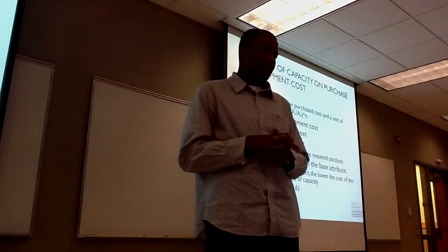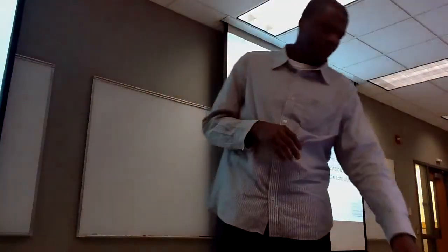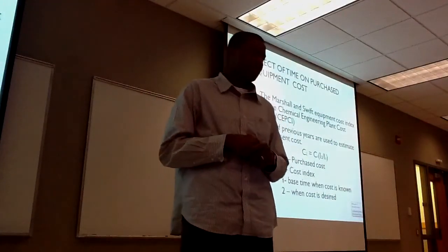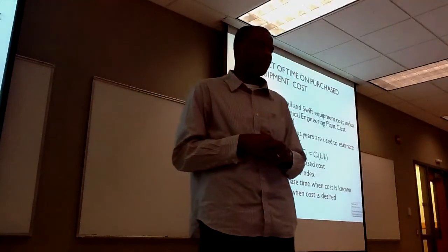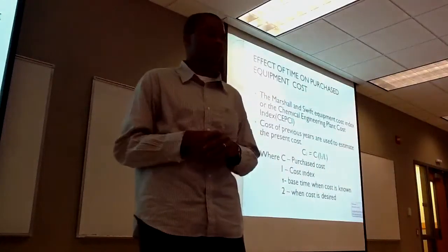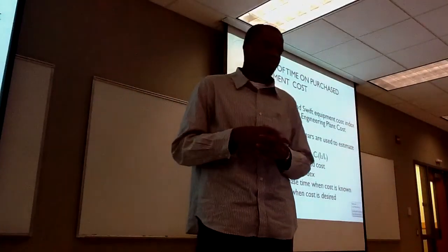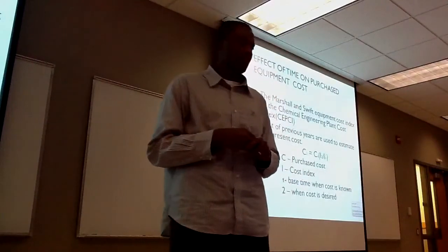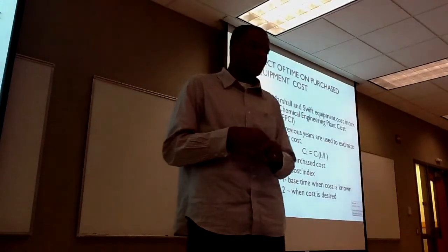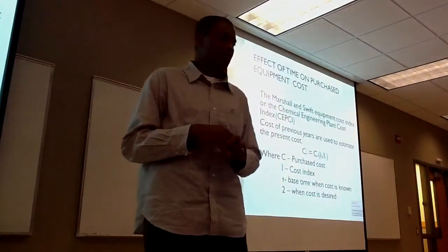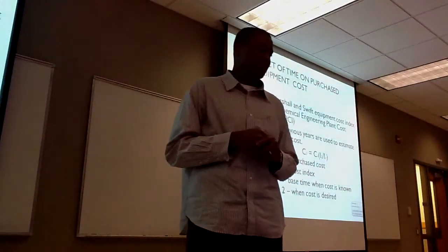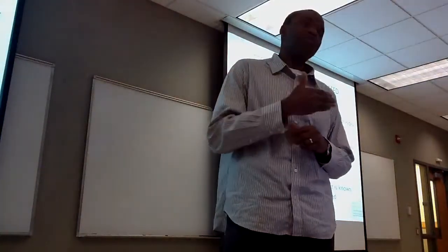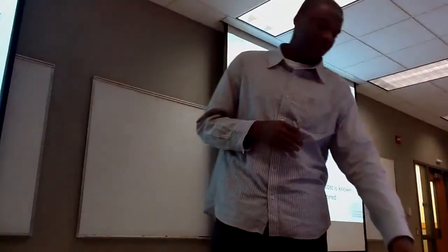The larger the equipment, the lower the cost per unit of capacity. Regarding the effect of time on purchased equipment cost, the Marshall and Smith Equipment Cost Index or the Chemical Engineering Plant Cost Index is used most commonly in estimating equipment cost. Previous years' costs are used to estimate the present cost using the formula: C2 = C1 × (I2 / I1), where C is the purchased cost, I is the cost index, subscript 1 is the base time when the cost was known, and subscript 2 is the present cost of the equipment.